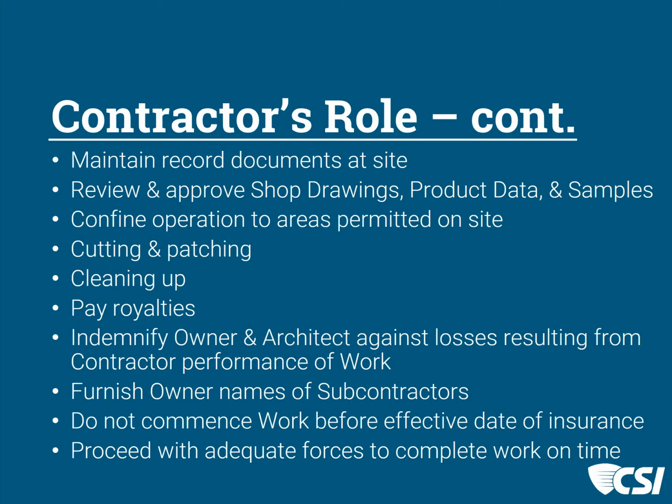They understand that if you involve them in the conversation. And I guess one other thing about the schedule is if you have a client that's got an unreasonable schedule, you're professional enough to understand that. If that client isn't willing to submit to some alteration of that, then you may be pre-informed of some issues you're going to have and be prepared for that. You can talk to your contractor friends and understand what's a reasonable period of time for a schedule. Try to use that when you put your project documents together.